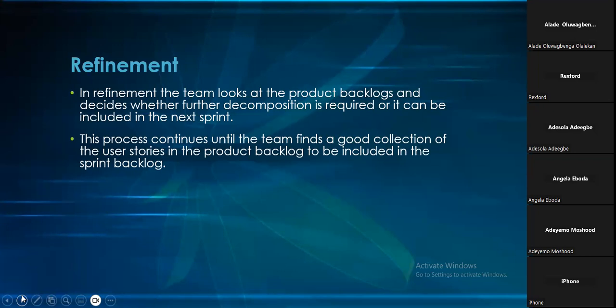So user stories, no, I'm not going to scatter your head. You get to understand it. So the stories in the product backlog item, they are going to be included into the sprint backlog. So that's what we are refining. And when we say into the sprint backlog, it will still be sitting on the approved column anyways. So when we do the sprint planning, we'll now move them into sprint backlog items. Then the PO part, okay, I've mentioned that the PO prioritizes the stories and then the team estimates.